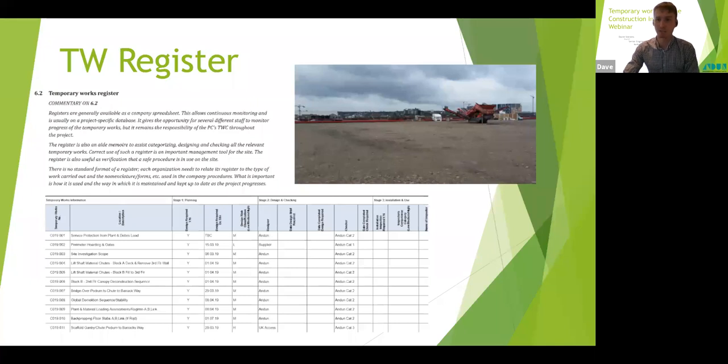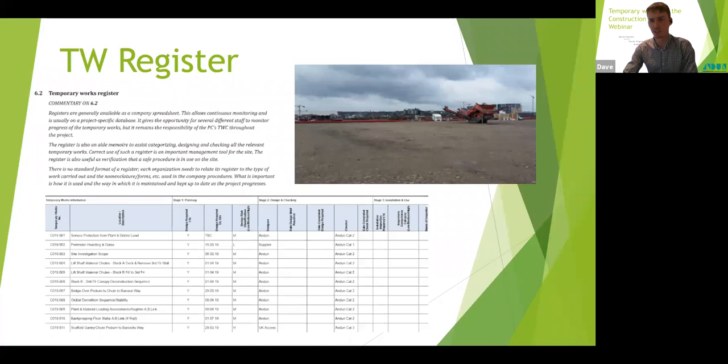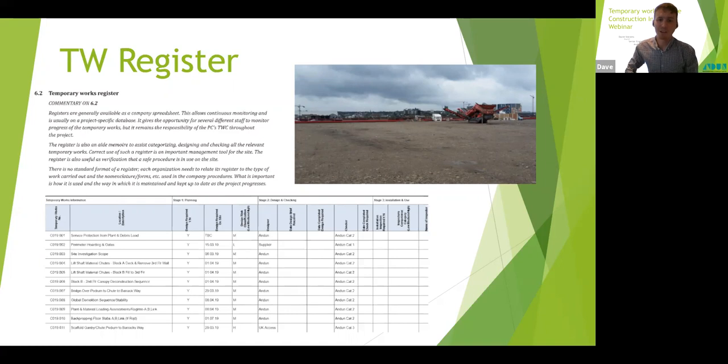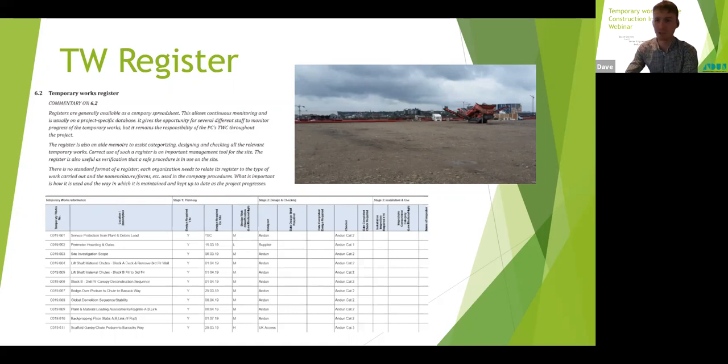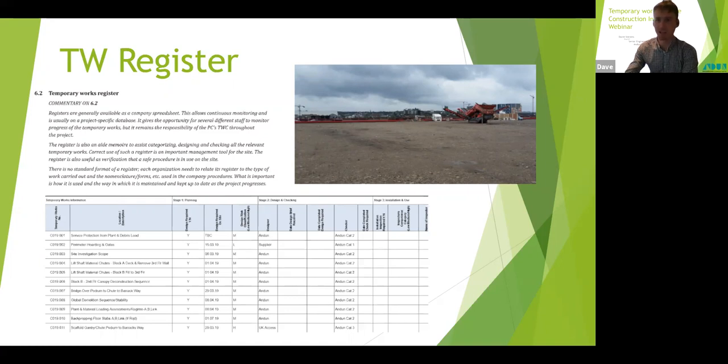You should also be keeping things like the check category, completion dates, your permits to load references. Everything can go onto this spreadsheet. It's normally a spreadsheet. They're normally dictated by the companies involved, but there's a lot of information on here. And if this is kept up to date and accurate, then it's going to help the designers by giving us the appropriate amount of time to carry out our designs and checks. This will also highlight with third-party approvals, getting approval from Network Rail or AIPs, highways. It takes a long time, generally. And highlighting when you need to get these designs carried out to get these approvals in place is only going to help your project. Otherwise, delays are going to be taken in. So it's a common saying that temporary works are always the last things considered and the first things required on site. So we really need to try and be better on how we plan these and how we get the information across to the designers to do the job in the appropriate amount of time. Rush jobs are never going to be the best solutions.